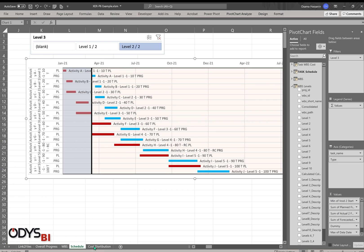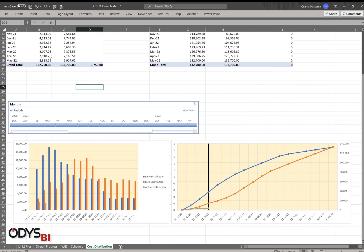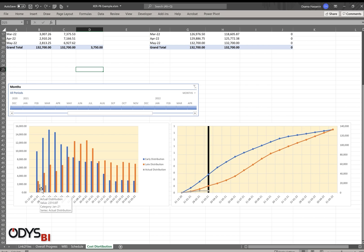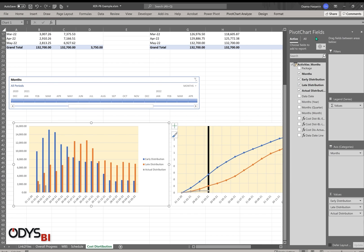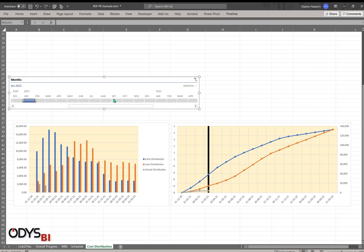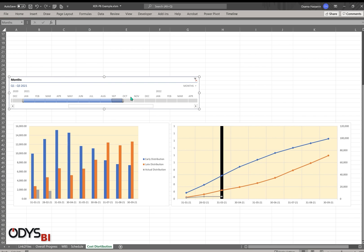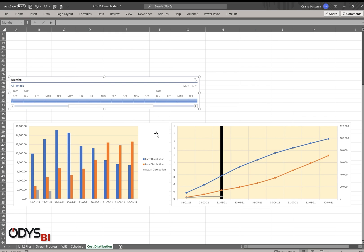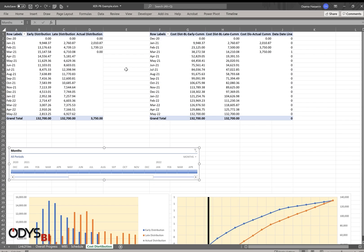Let's go to another amazing exercise, cost distribution. Here I have presented the cost per month, planned distribution, late distribution, and the actual distribution for the cost. Also, this chart presenting the cumulative chart. I have added one slicer. All these data also based on pivot tables and pivot charts. If I want to take interval from January up to September, it will be interactive with me. As you can see, I didn't create a dashboard containing all this information. I want you to see the raw data, how I created the data. But in the end, I can take all these charts and put them together in one dashboard.